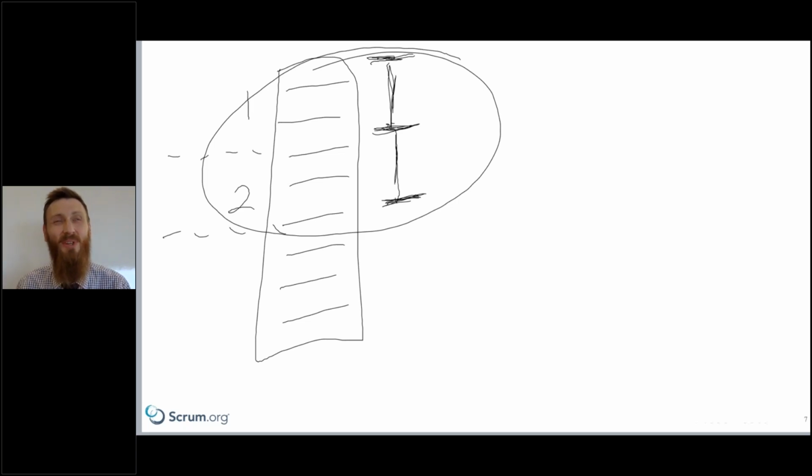If sprint planning is really painful, it seems like you're thrashing, you don't really understand the product backlog items being presented, or you always feel like you have to pull all these other people into sprint planning to get clarity, it probably means you're not refining your backlog enough looking forward for subsequent sprints. So what happens then is you end up doing refinement activities heavily in the first part of sprint planning, and then you run out of time box. How do we run out of time for sprint planning? It's because you were actually doing all this refinement, getting things in shape.